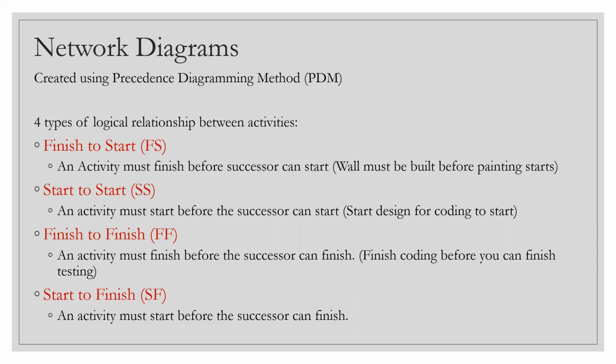Like finish your coding before you can finish the testing. This is something like the old conventional rule that we are not going to start the testing in between the coding. We will finish the complete coding and then finish the testing. So this activity also has to finish.